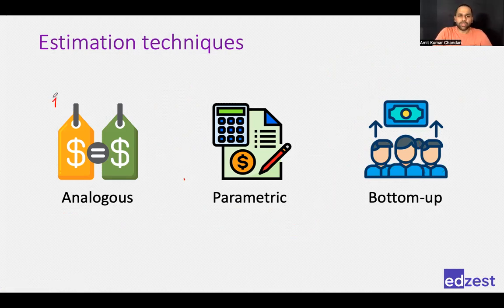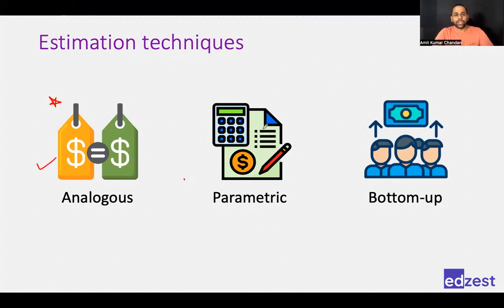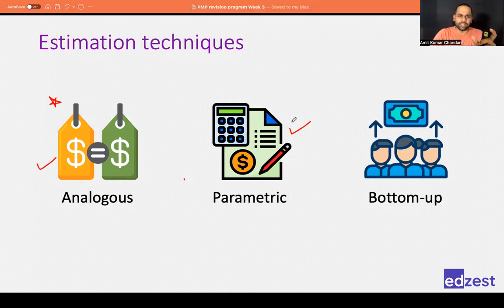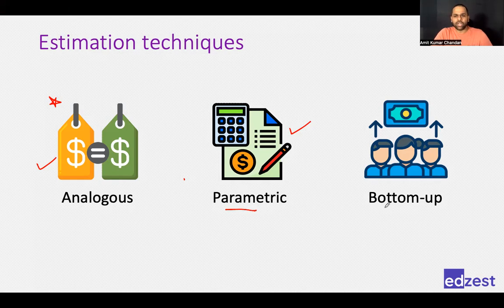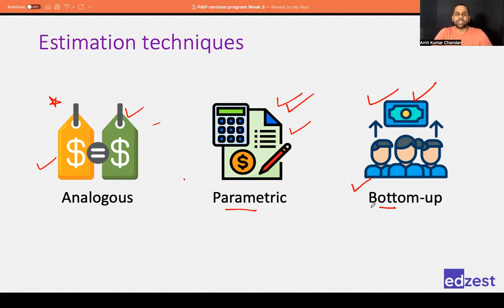What you need to know for the exam is when to use which technique and their advantages and disadvantages. If you have historical information and a like-to-like comparison, use analogous. If you have historical information but not like-to-like — some parameter and mathematical equation — use parametric. Bottom-up is breaking down to the lowest level and estimating; it is most accurate but time-consuming. Its accuracy depends on how accurate your historical information is.